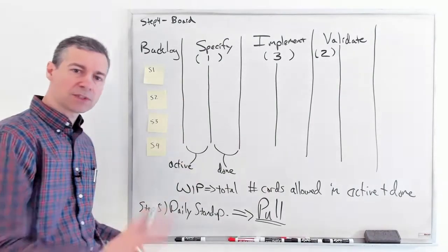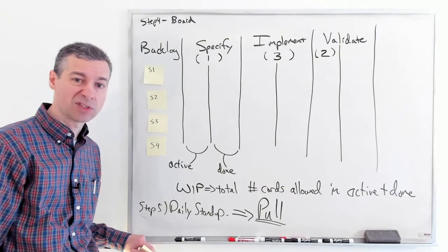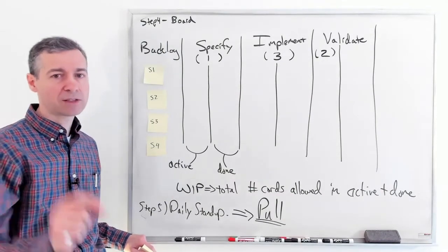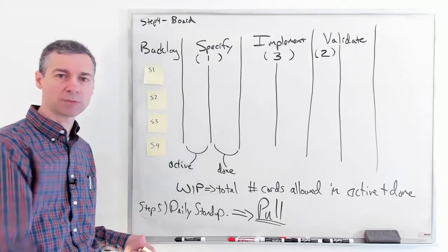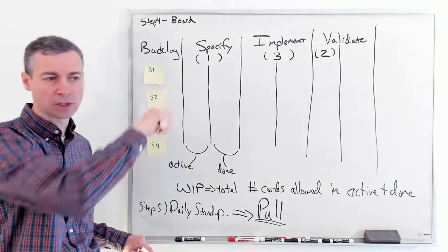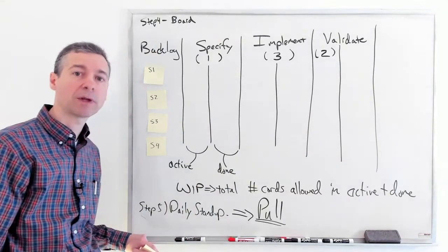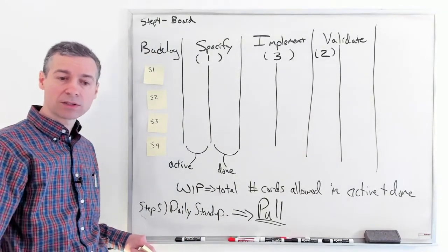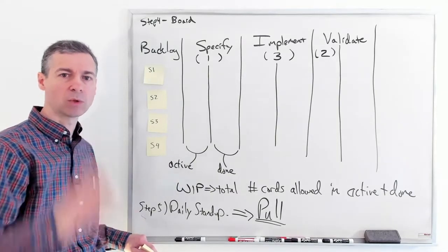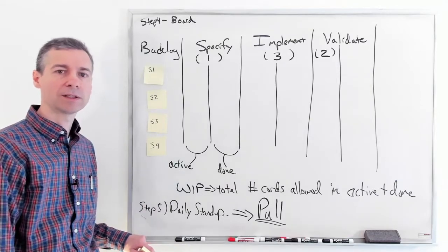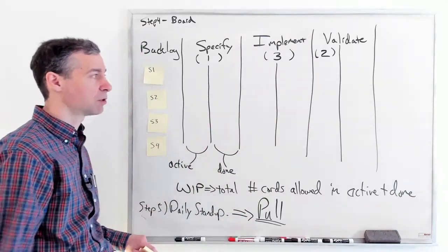And then the emphasis for the team is really to focus on, by looking at the board, where things are stuck and where things are blocked. That's what the discussions focus on. You take away some to-do items. These people are going to work. We're going to make the following changes to try to remove the reasons things are not flowing through properly right now and fix those blockages. So the stand-up turns into, let's just talk about what's stopping us from getting work done, with a lot less status reporting. You're going to update this through pulling the cards. I'll show you in a moment.